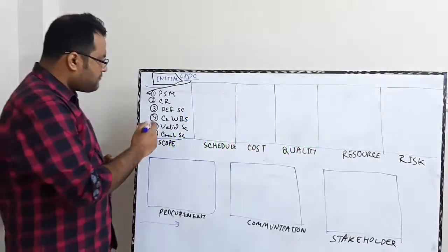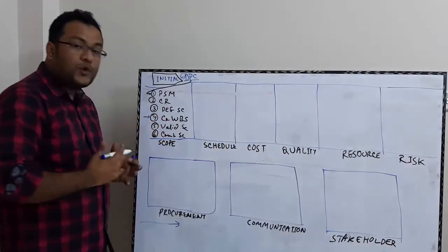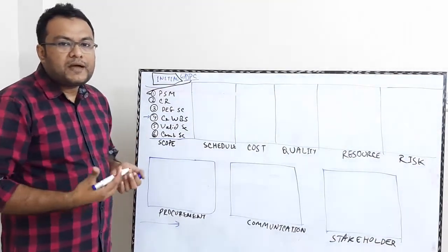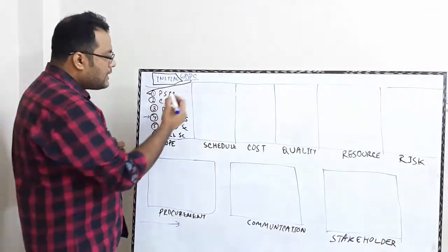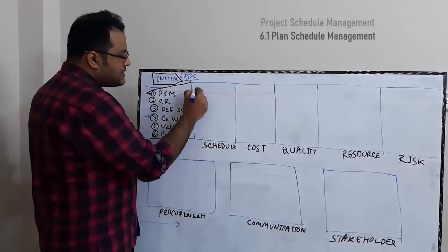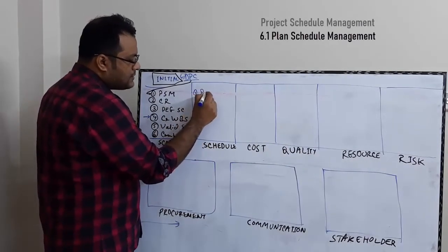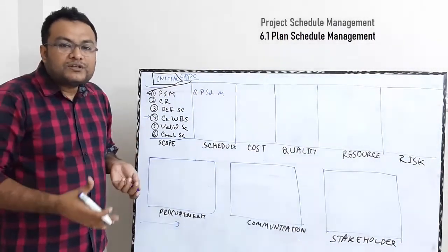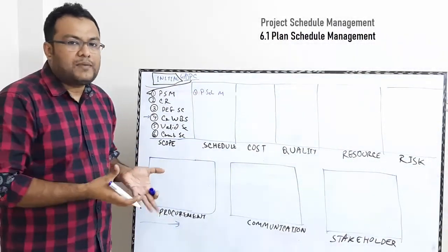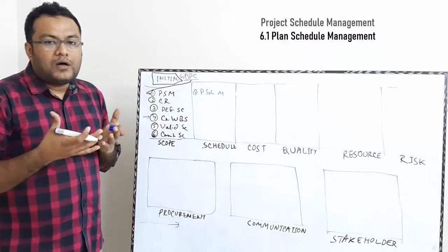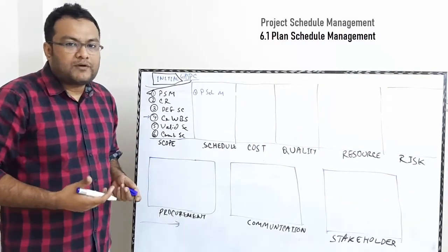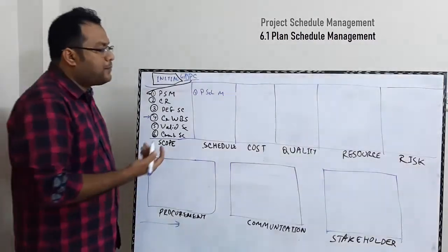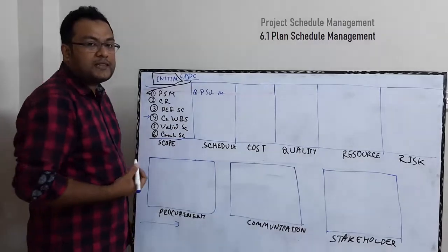Now that you have your WBS and you know what you are doing, you have a base to prepare for your scheduling. In the schedule management knowledge area, first we talk about plan schedule management: policies, procedures, what the units of measure will be, whether it is an hourly, weekly, monthly or daily plan, how frequently we will manage project performance, and what the control thresholds are. Those sorts of policy level decisions are made in plan schedule management.